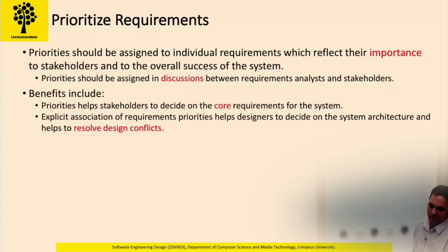The benefit of assigning priorities to requirements is that if you get a high priority set of requirements, those are the core requirements of the system. So you develop or deliver them first, and then you focus on the rest.